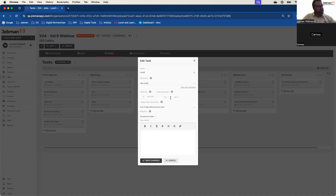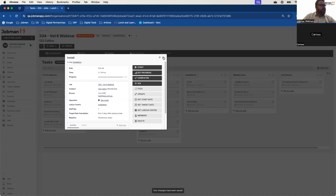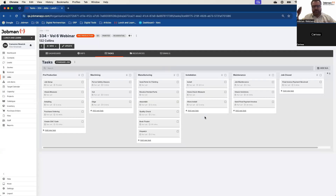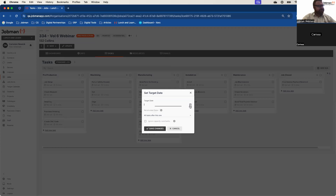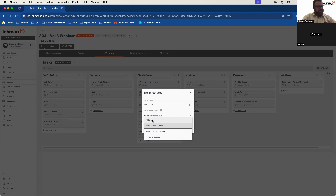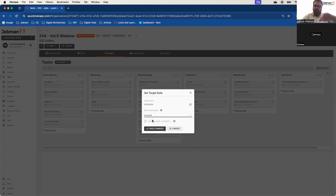The beauty of JobMan is I don't have to worry about that — JobMan can do all that for me. Set my target date — let's make it the 31st of May, we're confident we can get it in by then. Change this calculation to 'all tasks' because I want to see all the dates before and all behind. I want JobMan to do its job. Hit save changes. What JobMan is going to do is take that critical date, set it as the target date — that's the date it has to be done by. That's the fundamental difference between target dates and start dates: a target date is the date it has to be done by.